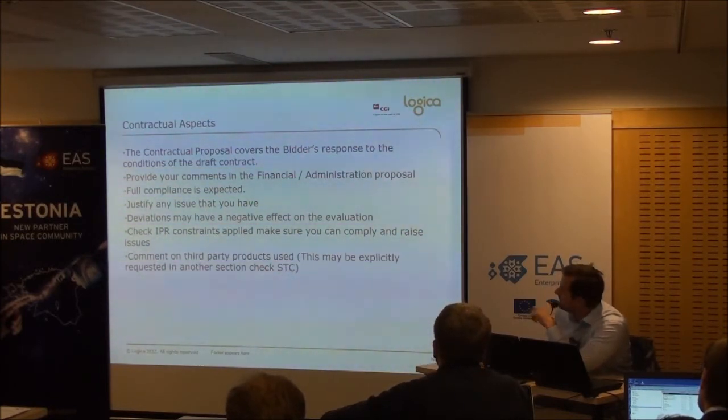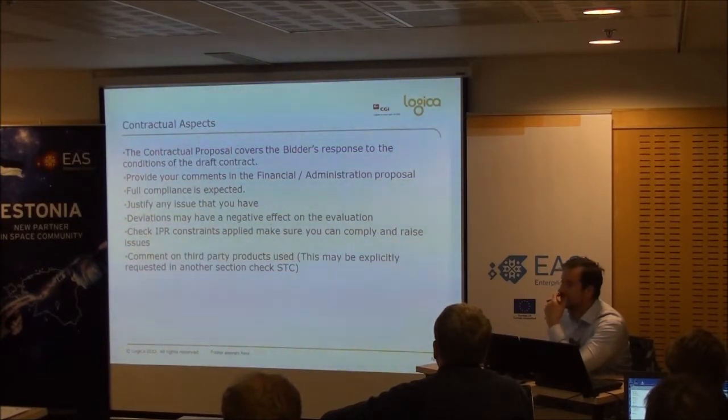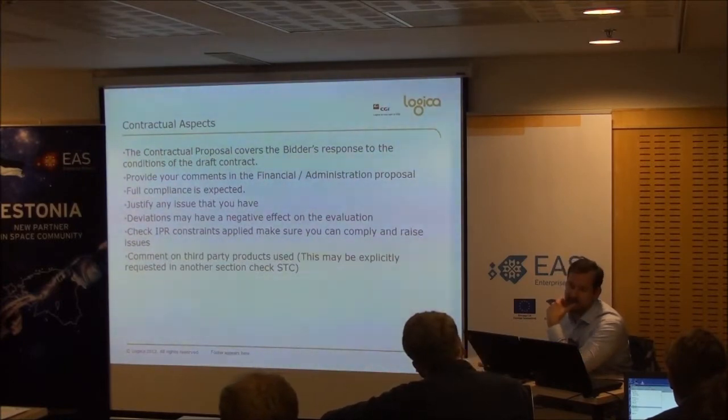Usually in the financial bit, which often includes the contractual aspects, you are going to need to respond with your compliance to their contract. Yes, we're all happy, or no, sorry, these 2 or 3 bits are a real problem for us. But you will have to justify that. They tend to look for full compliance. So if something's really painful for you, highlight it and suggest some rewording, perhaps. Perhaps it's the wording of the statement. All I'm trying to say is compliance is usually expected. So you have to be very, very clear if you're going to reject something, and very clear as to why.